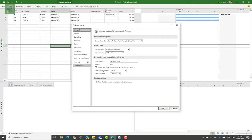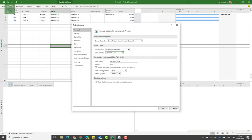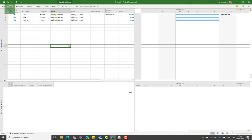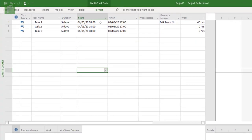In order to add the time in the start and finish fields, we're going to go into File, Options, and then we have the General tab which has the date format. We're going to change that into the one on the top which actually has the time in there as well.